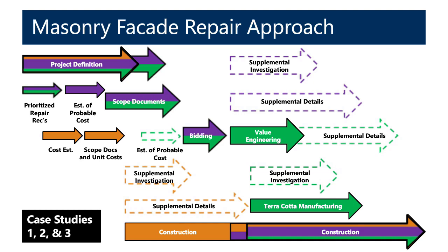All the way to processing the cost for how you get the cost for the project, unit costs, small bid forms, large bid forms, phasing things out even after getting numbers back. Sometimes the owner has a certain number in mind as far as budget, and is that something that can be accomplished in 2 years, or going to take 3 years, or is it something that you want to even spread out further, maybe address one side of the building every other year? Something that the owner and architect has to deal with.